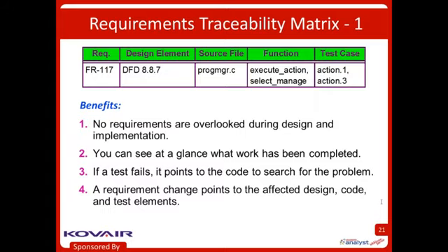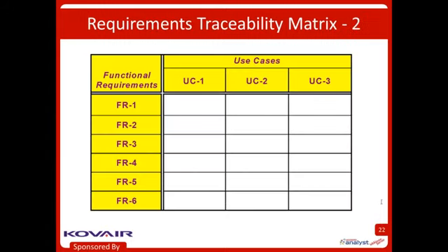That's your choice. So the requirements management tools show the traceability matrix a little differently. They'll have a table like this that shows the functional requirements maybe connected to use cases, and you can set up these little arrows that show which functional requirements came from each use case. And then suppose you modify a use case, then you'll get some kind of visual indicator like this that shows, oh, you might want to go check the other end of those links and see if you have to update those requirements now to reflect changes in the use case.